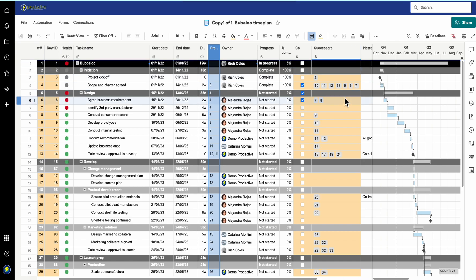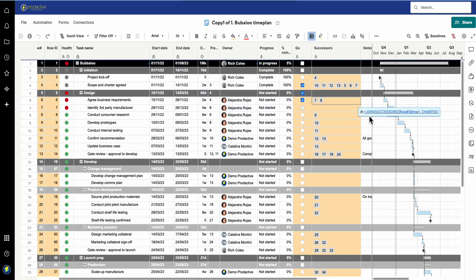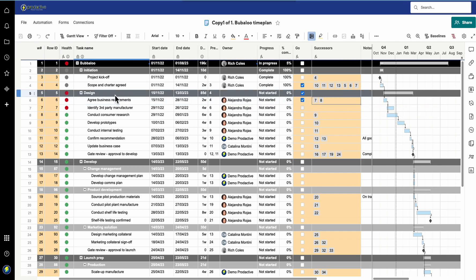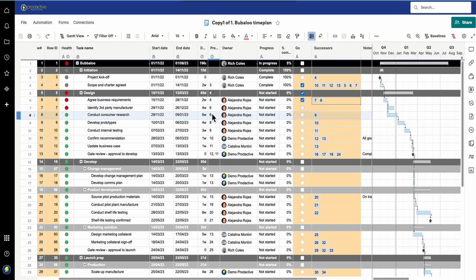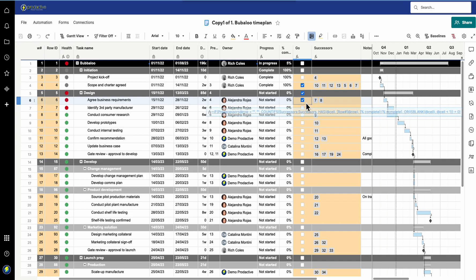The successors column is the opposite of your predecessor column, which automatically comes on when you enable dependencies. The successors column is a formula that you need to add in. What it will do is look and say what are the tasks that follow on - the successors of this task. So on row 6, the tasks that follow on are 7 and 8, as you can see from the arrows there.